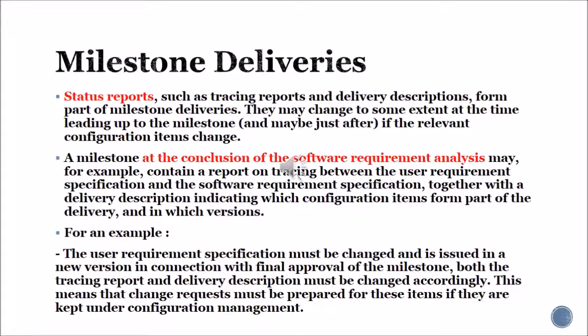A milestone at the conclusion of the software requirement analysis may, for example, contain a report on tracing between the user requirement specification and the software requirement specification, together with the delivery description indicating which configuration items form part of the delivery and in which versions.